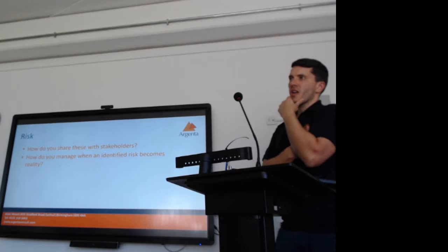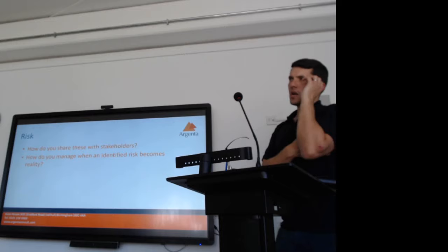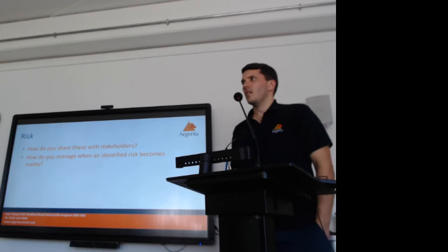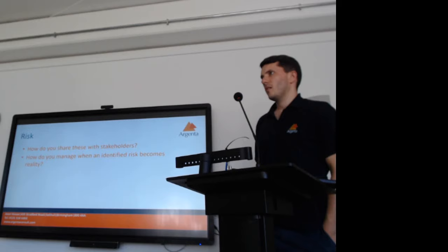But then in reality, that meant we pushed the hardware part to the end. The risk did rear its head and we ended up being several months late. Whereas if we'd done that up front, we probably could have contained that risk a bit more or done something more with it. So that's where risk really comes in for me. I need to understand it enough to prioritize at the beginning of the project.